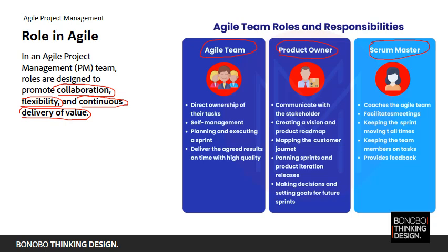So let's move on to the agile process again, a quick recap on that. As I said, agile primarily focuses on planning, design, developing, testing, deploying, reviewing, and launching, but it is done in an iterative manner. So a key aspect of the process is incremental iterative delivery, and therefore the projects are broken down into small manageable units, and each iteration typically lasts between 1 to 4 weeks and results in a working product increment. And similar cycles are repeated for each unit of the work in a meticulously organized and collaborative way.